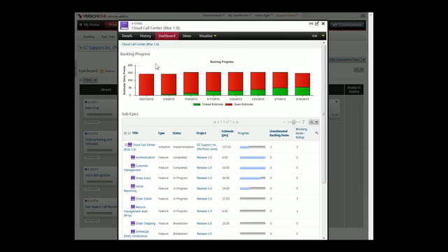But one thing that does stand out from this view is that we did a lot of breakdown right at the beginning. So we had all of our stories defined almost up to that 150 mark at the very beginning of this epic. That may have been something where we removed a lot of risk, but we also probably spent a lot of time and discussions getting to that point where we had all those stories. So that may or may not be the right thing for the organization, but you can get a feeling for how we create stories over time for this particular epic.